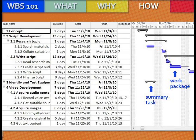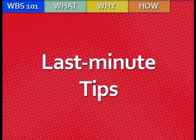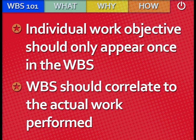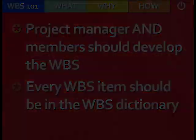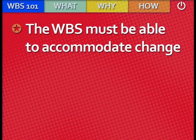Now that you've learned how to create a WBS using Microsoft Project, why don't you try it on your own? Before getting started, here are some last-minute tips. Each individual work objective should appear only once throughout a WBS. All major categories should be the sum of all the tasks in its sub-levels. The WBS should correlate to the actual work which needs to be performed. Project team members, as well as the project manager, should be heavily involved in the development of the WBS. The WBS dictionary should accompany every item to ensure efficient understanding of the tasks. Finally, the WBS must be able to accommodate changes that often occur during any project.